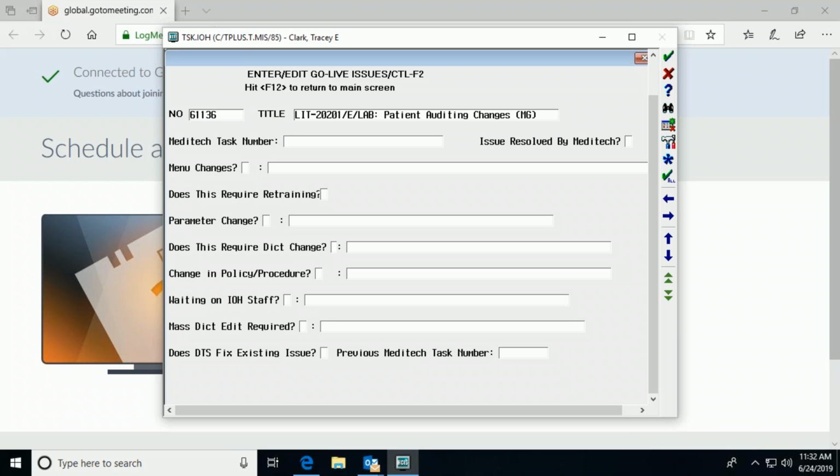And so that is a really important assessment for you as a tester to make. And if you're not positive yourself, by all means, consult with other people to do that. And that can be then searched on as you're getting closer to go live. The training coordinator, the person who's trying to put together a training plan, can very easily then search the entire project for any DTS where someone answered capital Y to that query. Does that make sense to people?